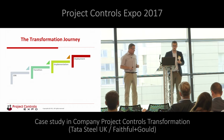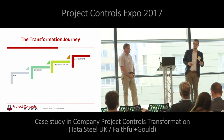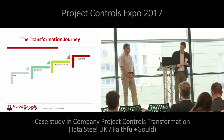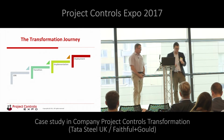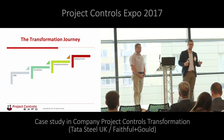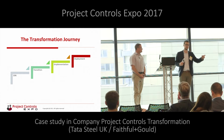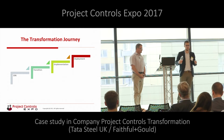Yeah, so as I said earlier, it kicked off in earnest about 12 months ago for us within the project department. We looked at an integrated baseline review or a maturity analysis, whatever you want to call it, around September last year. So September to December, 3 months, was understanding what we have, what's best practice, and how we plug the gaps. How do we get there?